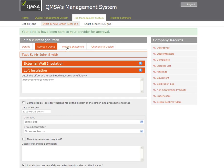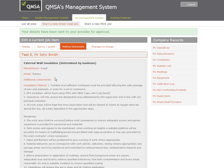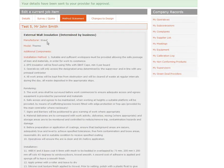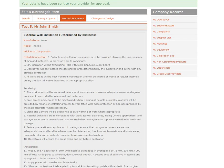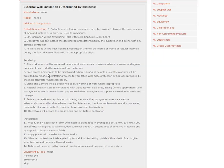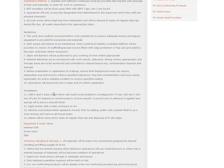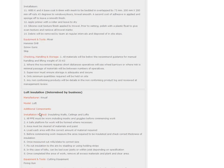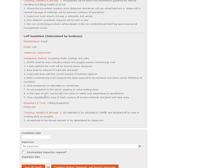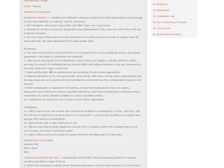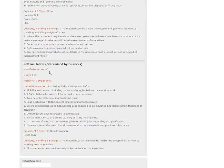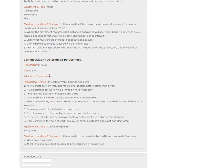Once I'm happy with that I can go to my next section which is the method statement. For each of these measures I've now got details of the make, the model, a step by step method requirement. I've got an equipment list and checking, handling and storage. These are all requirements of PAS 2030 and we've built this into the system for you.